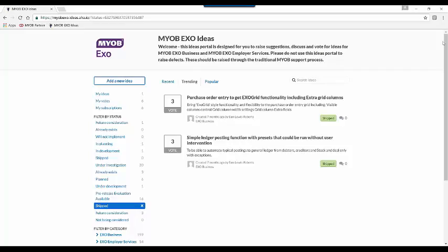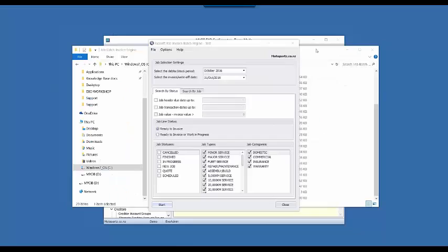So you can have a look in there to make sure that that job is tracking, particularly if you've got a long lead time on jobs. When you set up the budget or the quote against it, the turnaround might be a few months before it's invoiced, and costs can fluctuate quite significantly in that period of time. So at that point, you can keep an eye on it, and you can periodically check that tab or run that report, and just keep an eye on how you're actually tracking against what you envisioned this job being worth to you when it was first opened.